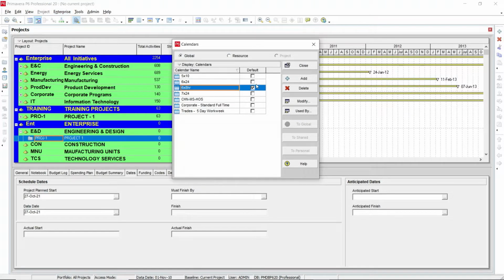So you need to understand what is a calendar. These calendars can define the number of available work hours in each calendar day. You can then create and assign calendar to each resource and each activity. The Primavera module uses your calendar for scheduling and tracking activities and also leveling resources across your organization. You can link resources and project calendars to global calendars.